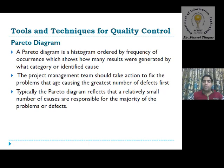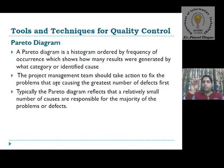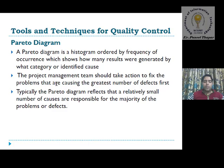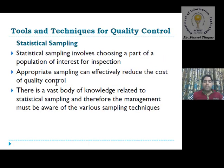The project management team should take action to fix problems causing the greatest number of defects. With the help of the histogram we know at which level the most causes are concentrated, so the team can control those causes at that level. Typically, a Pareto diagram reflects that a relatively small number of causes are responsible for the majority of problems or defects.